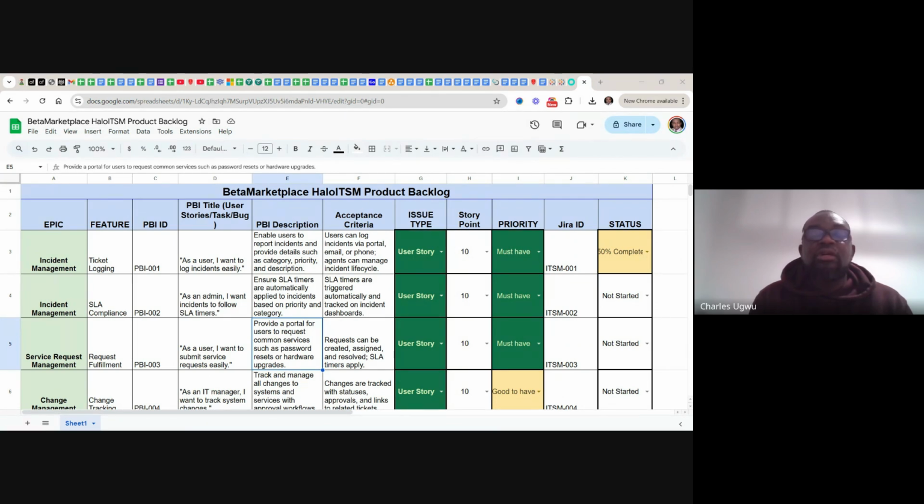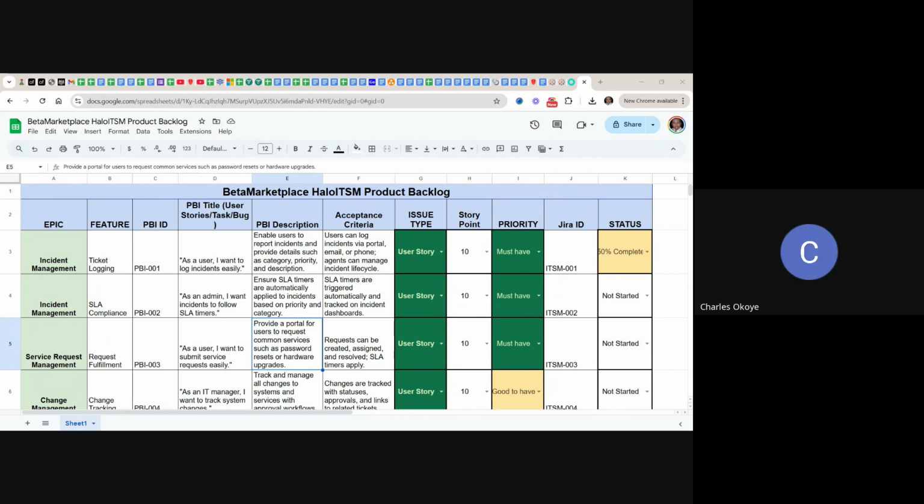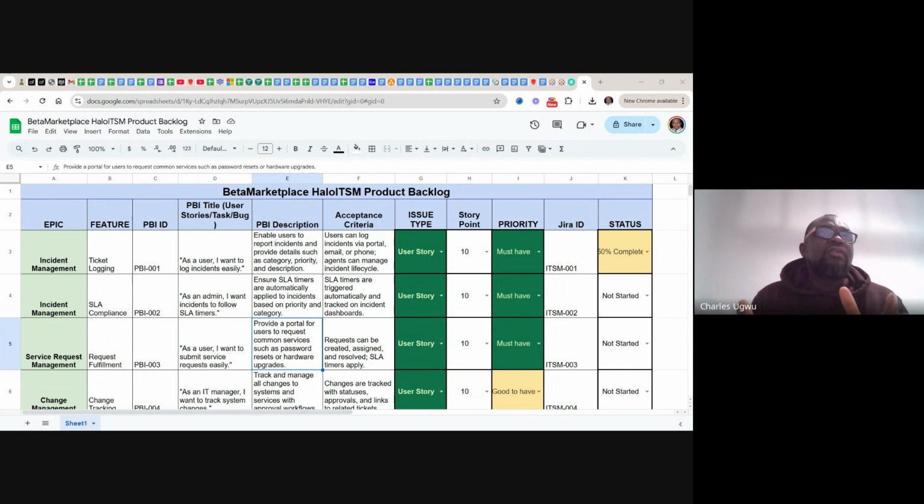So at the end of the day, to make sure that every voice is carried along, we use the average to determine the story point. Are you getting it? I'm getting it, sir. And so everybody's input has been captured during the grooming. We are grooming this user story to make sure we understand the effort to deliver it. That is the best way to do that.